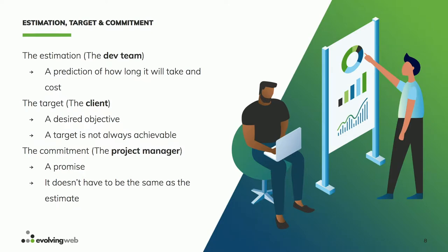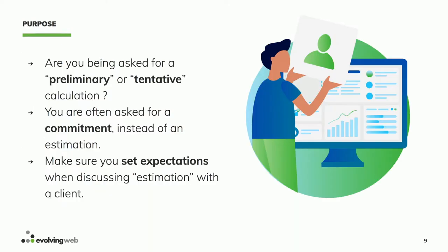Now, it's very clear that the same thing, an estimate, often a single number, when it has these three conflicting goals and stakeholders, it's quite tricky to figure out what are we actually talking about and what are we producing. And this multifaceted nature of what an estimate is is often responsible for why projects go over budget. We said it would take 1,000 hours, but is that what we wanted it to take, rather than what we thought it was actually going to take? So this is an idea that you need to be mindful of.